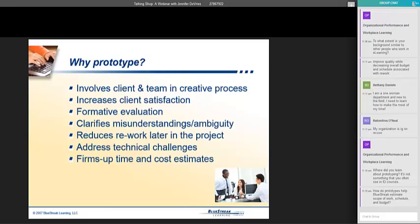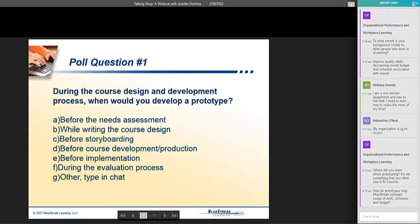I know that if I'm developing a certain type of interaction, for example, let's say I'm using Articulate Engage and I'm developing a tabs interaction, my ratio for authoring, by the way, not writing, but authoring, is 0.75 hours for each one of those tabs interactions. So if I know how many of those I'm doing, I know how to estimate my scope of work and my schedule. How many of those do I do in a day, and the budget, all of that comes out of the number and the types of components that are going to be in the course.